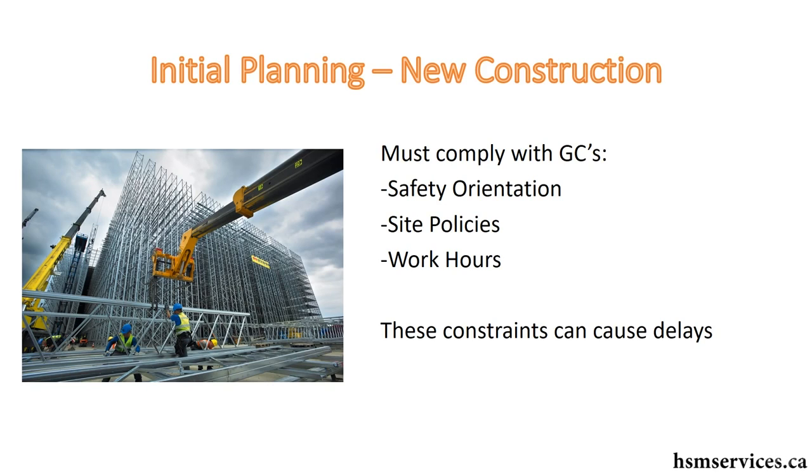The general contractor may say you can only work from 9 to 5, so if you've only got 3 days and you have to work 9 to 5, you can't work late. Do you have enough time to complete the project? All these constraints can cause delays or increase your costs, and you have to factor that in when you price this job out.